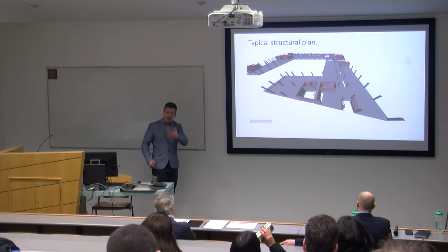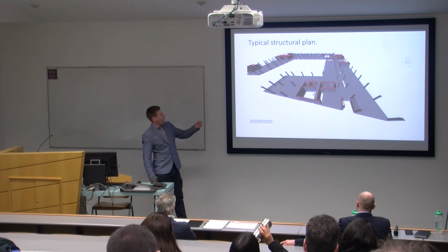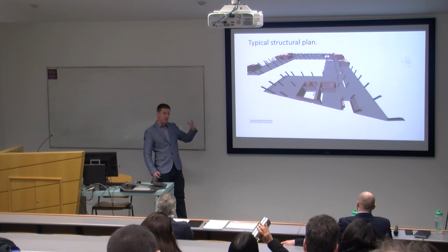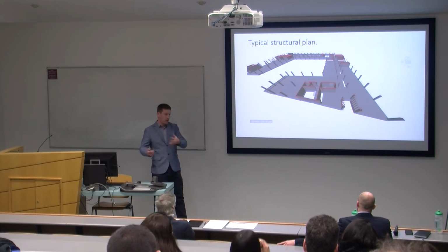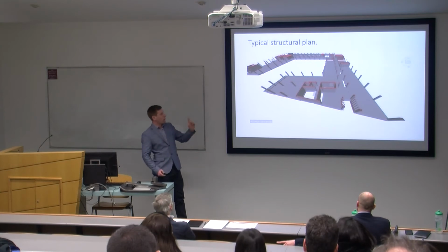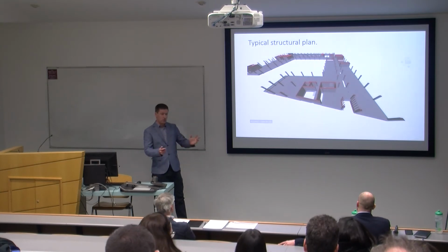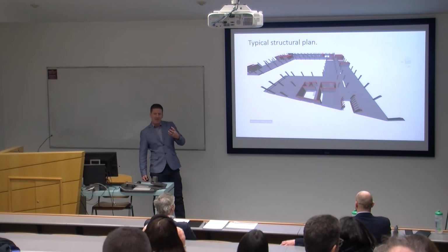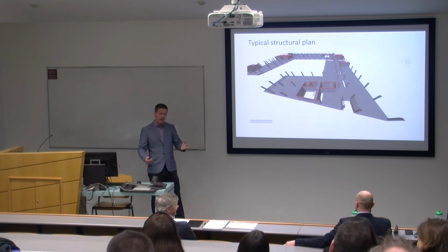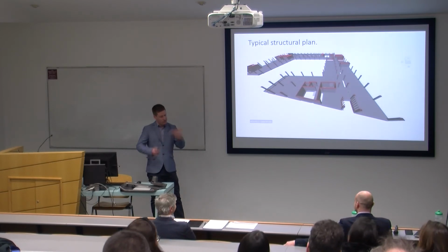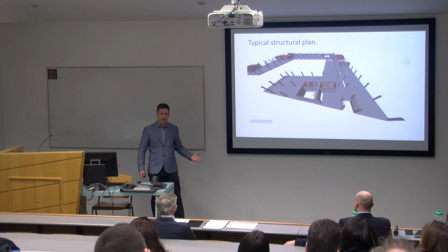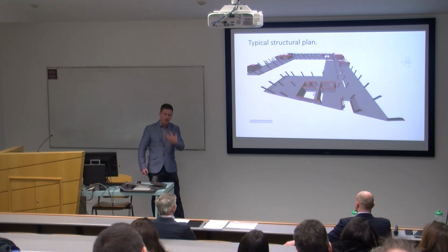Now, I know a lot of you might know that anyway, but some issues, or challenges, we had with the model. Sometimes the model gets updated. It's one of the things with BIM, I guess, or the way models are done these days. On one of the levels, the entire superstructure moved to the west 100 mil, which is a big deal. But we caught it, we spotted it, because that's what you do as engineers. You can't assume anything's right. You have to look out for this and you have to spot it.